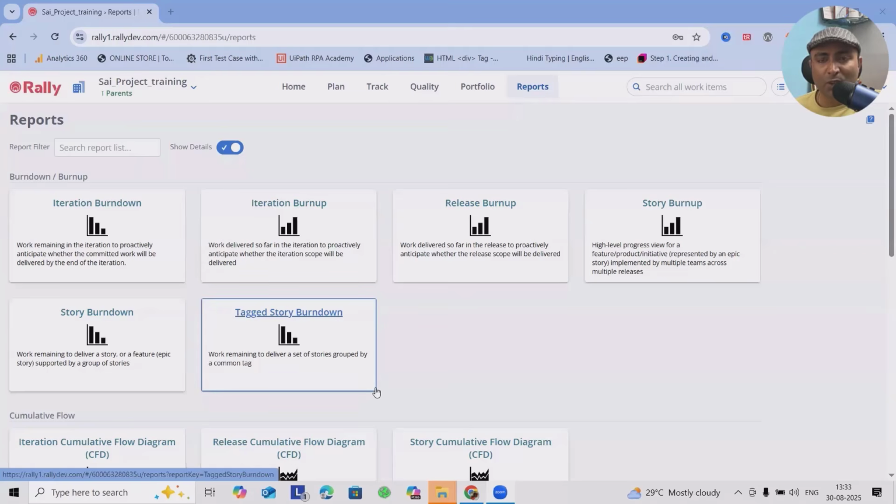A burn-up chart is a visual tool that tracks a project's progress over time, displaying the total work scope and the work completed by the team in an agile project or sprint. As the work progresses, the work completed line moves upward, showing how much has been done, while the total work line shows the overall scope rising or falling with scope changes. The chart helps your team and stakeholders understand project trajectory, anticipate completions, and manage scope changes effectively.